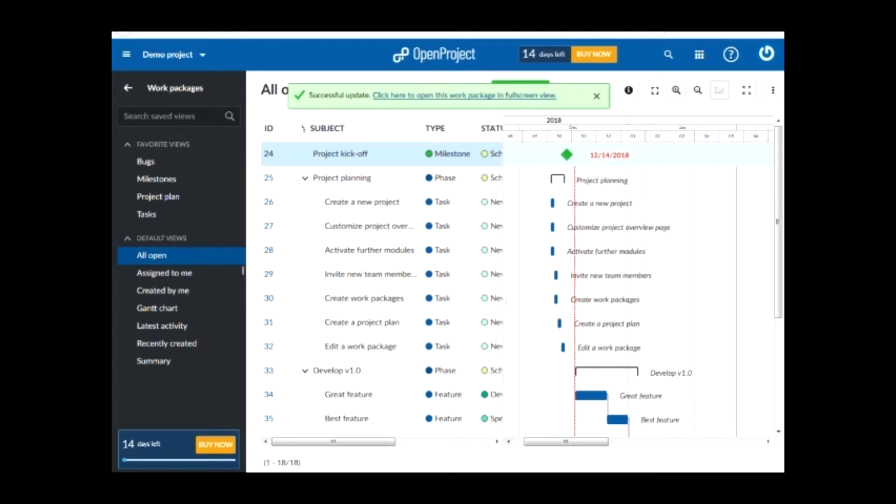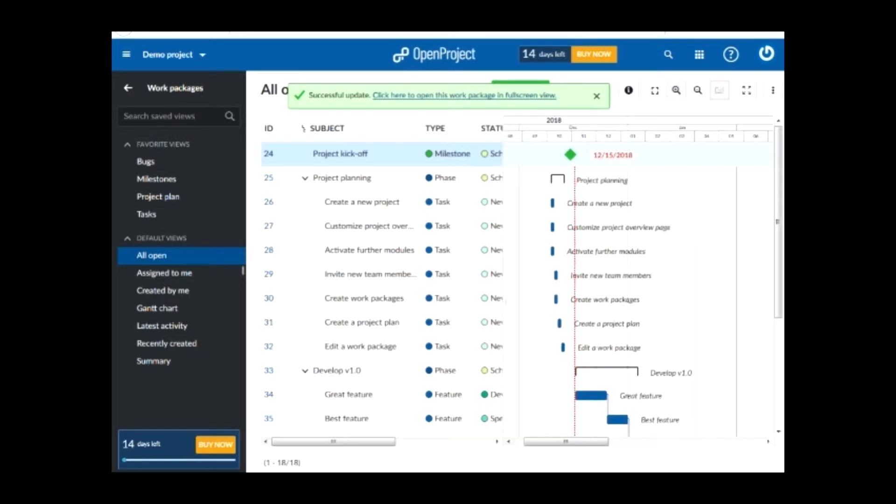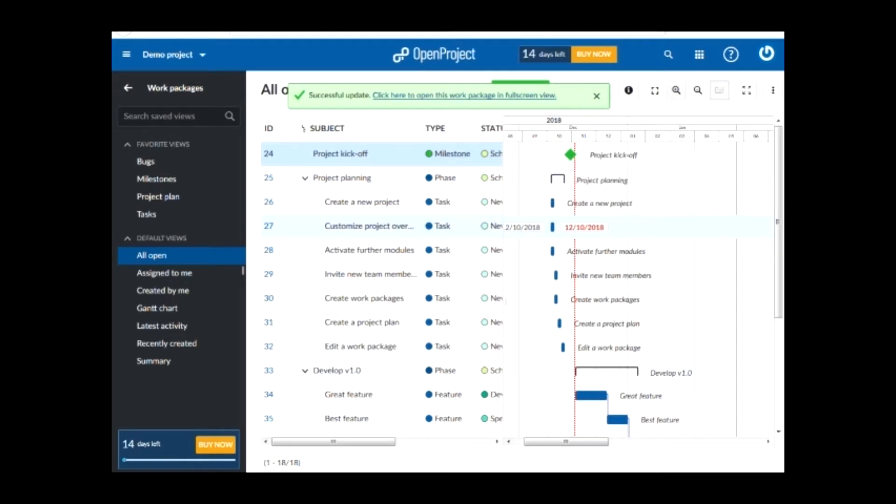By clicking on it and dragging it on the left or on the right, you can change its date. You can do the same with the tasks that are below the project planning. Click on them and drag it.